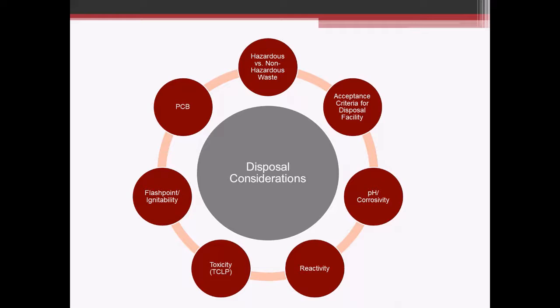There are some pretty serious impacts if you dispose of a hazardous waste at a facility that isn't allowed to accept that type of waste. So characterizing what you have as hazardous and what you can dispose of as non-hazardous is always a good initial step on the disposal criteria.